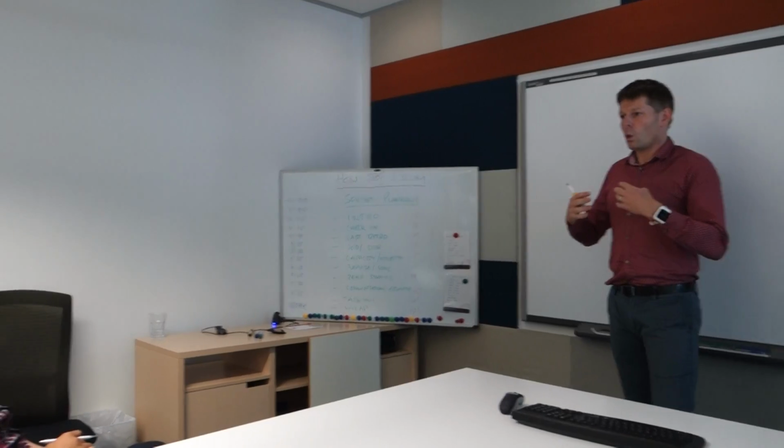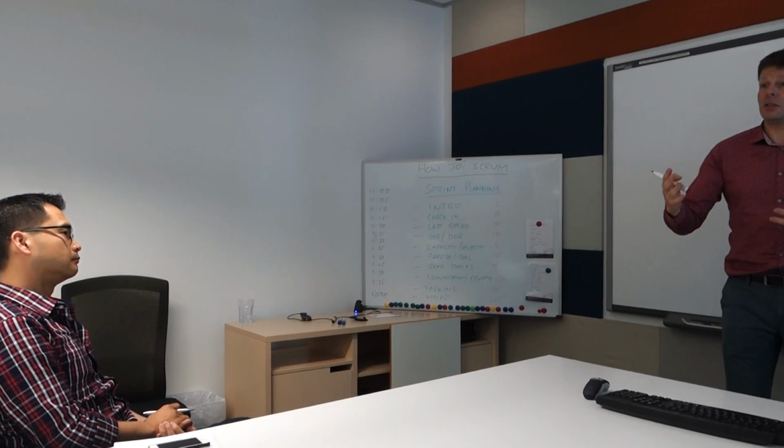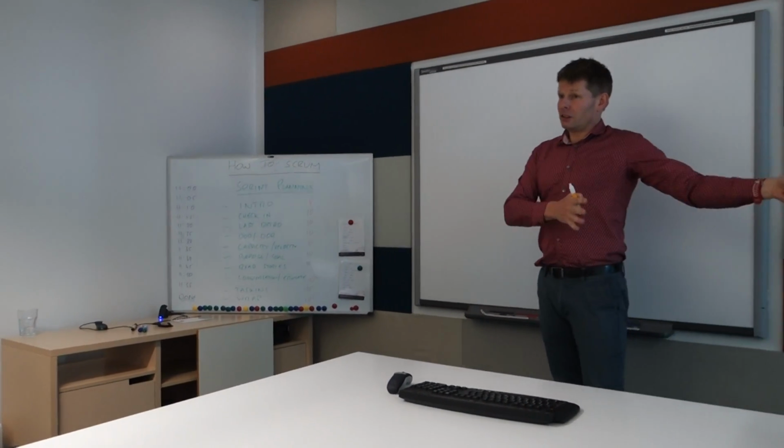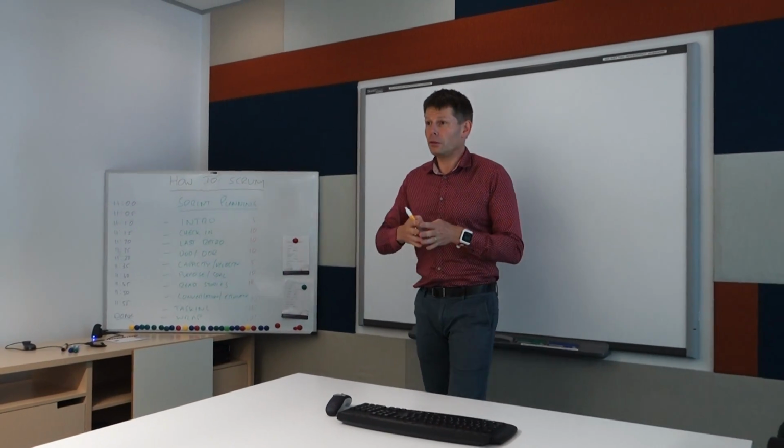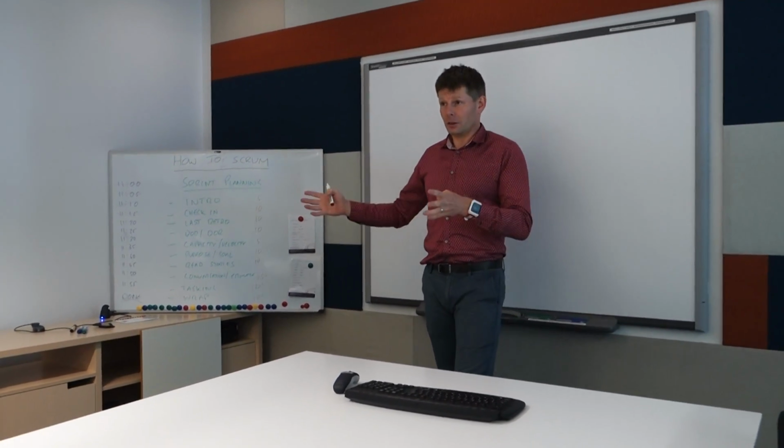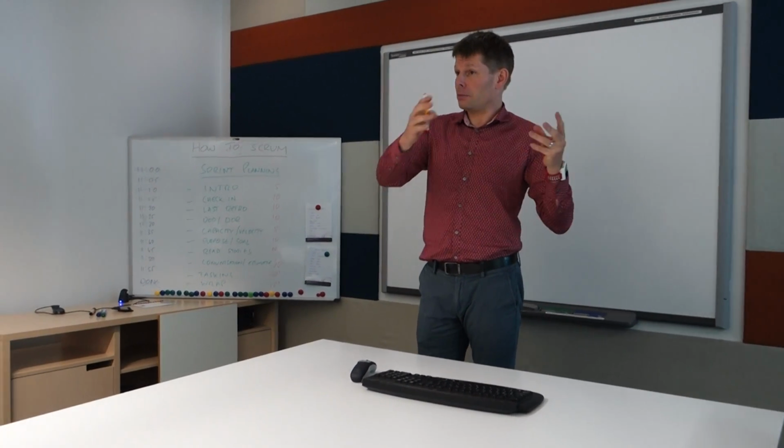And so you're going to present to the team the higher purpose and the why and the goal of the sprint. We're going to talk through these user stories piece by piece. And then the team is going to work out, based on yesterday's weather, based on what we did last sprint, what we think is reasonable to do this sprint. So we're going to forecast our work. We're going to do some estimating, we're going to look at the high level, and we're going to pull from the product backlog into a sprint backlog, user stories, product backlog items that we think we can achieve.